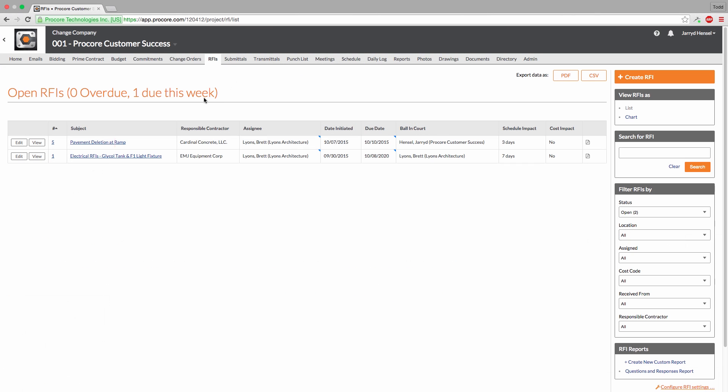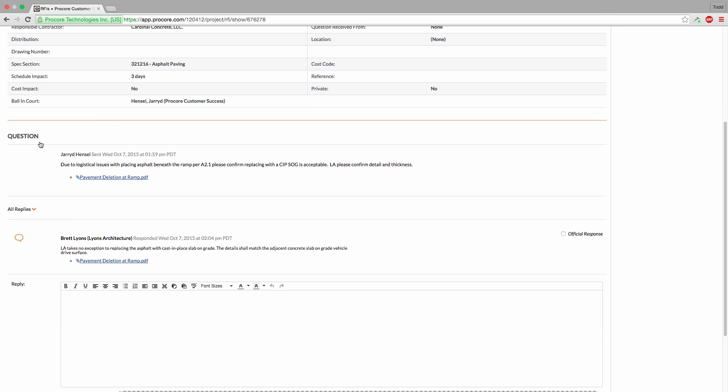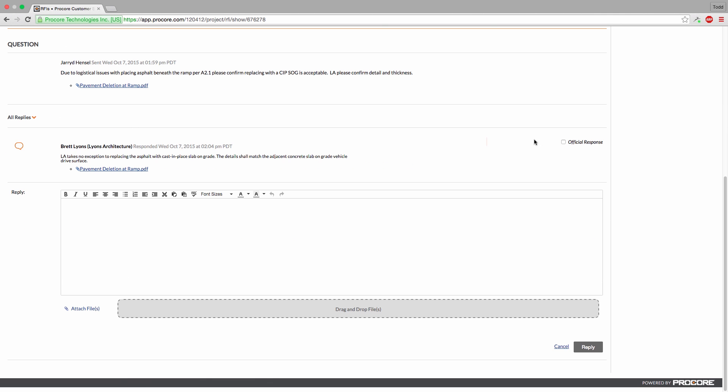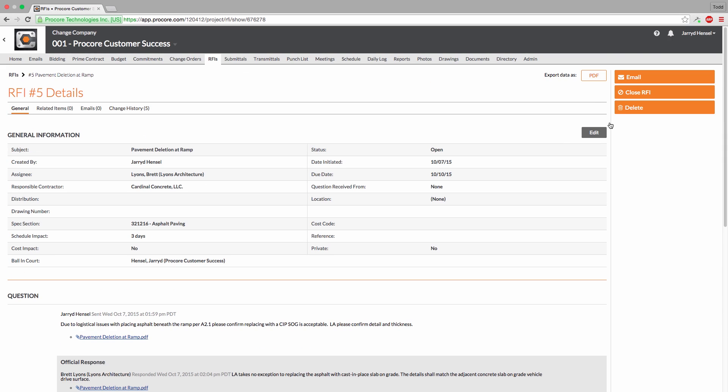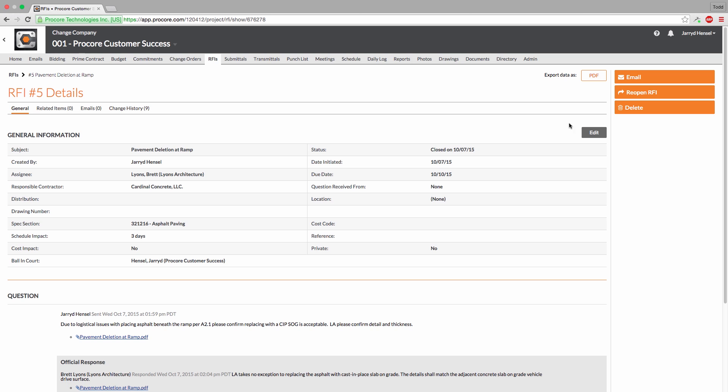Admin permissioned users can now review the RFI, mark the official response, and close the RFI if they see fit. If necessary, admins can also reassign the RFI to a new person by clicking the Edit button and changing the Assignee.